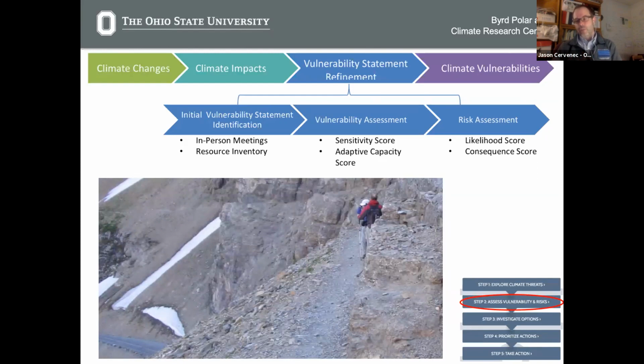Imagine what that looks like if we combine our blindfolded race with walking on this cliff trail, right? Consequence high, chance of falling high. Those are things you're very worried about. You don't want to combine those two, because those are the highest risk things and the things Columbus would be most worried about. And so that's kind of a way to capture how you multiply the consequence by the likelihood.